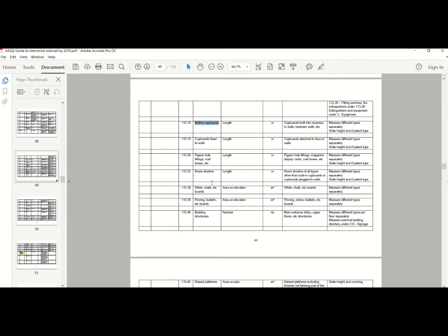You might get an idea or feel of cupboards, and you try and take that rate, add the installation cost, the labor cost, the margin of profit, and so on. You just make an allowance there. You can use your discretion on that. I'm not going to mark those items too strictly. The main thing is that it should be in the ballpark, more or less.